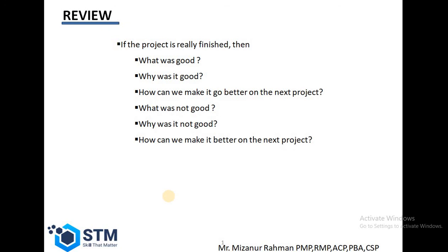Then we ask what was not good in the project, why it was not good, and how we can be better in the next project. So always we have to ask the team members about the good things first. If we directly ask about the bad things, then they are not going to say.